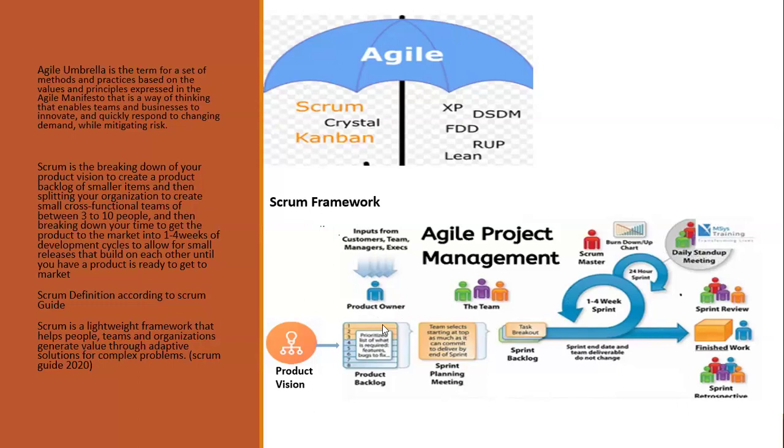The only person that has the right to manage the product backlog is the product owner, right? Except they delegate the task to somebody else to do, but the product owner is the person that will be held accountable for anything that goes wrong here. So in this product backlog, the product owner will prioritize what is going to be built, right?